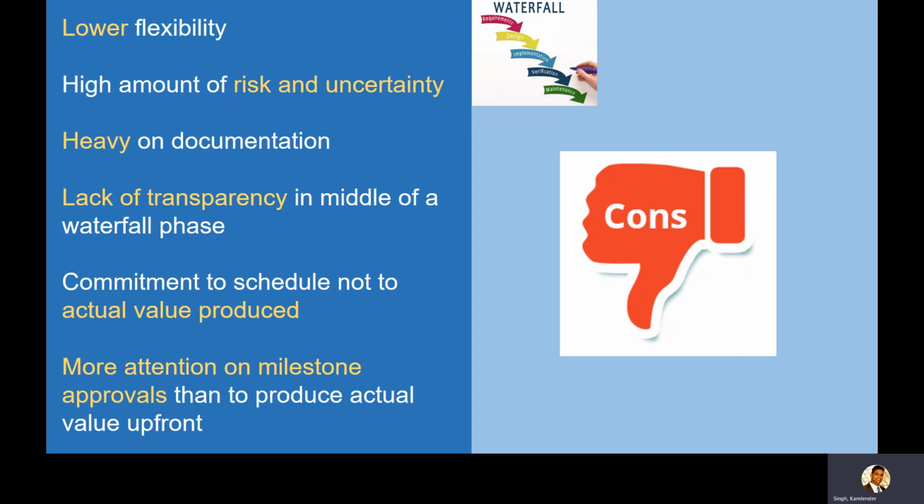Risk and uncertainty, because over a period of 3 years, let's say if a project is being developed in the waterfall model for 3 years, what can change? The market demand can change. Competitors have come up with a new product or a new initiative. Anything can change. Hence, the risk and uncertainty increases.